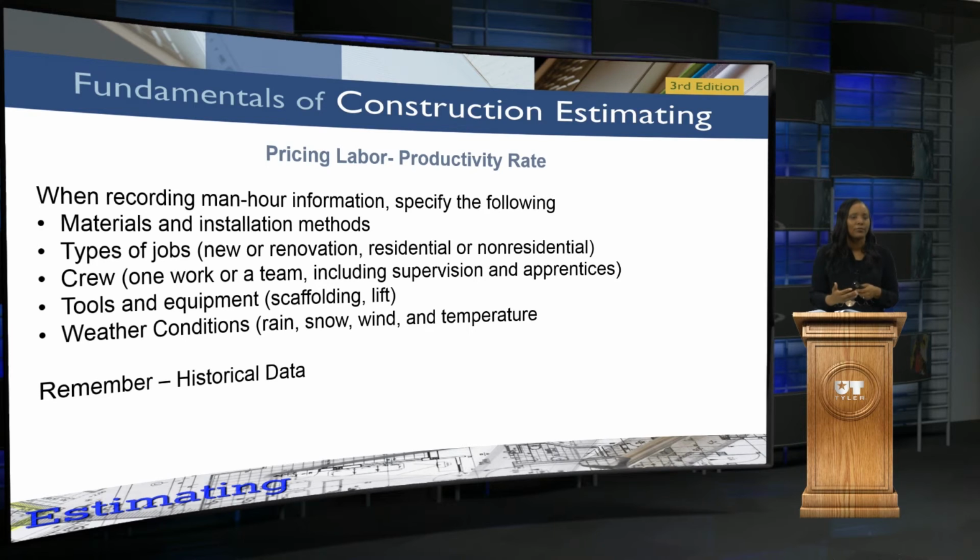Also, you're thinking about rental rates as well. How much does it cost if I were to keep this on the site for a while? Am I going to have to figure out how to utilize this particular crane so that I don't have to take it down and put it back up again? Because it's going to be a lot more cost effective for you in the long run if you can keep that crane in one location instead of taking it down, reinstalling, and doing a whole other process over again, okay? So also just the weather conditions. We always have to consider weather conditions. And of course, just remembering that historical data.